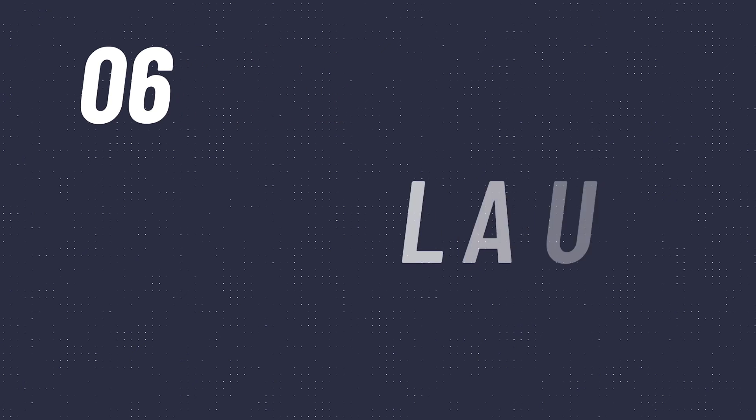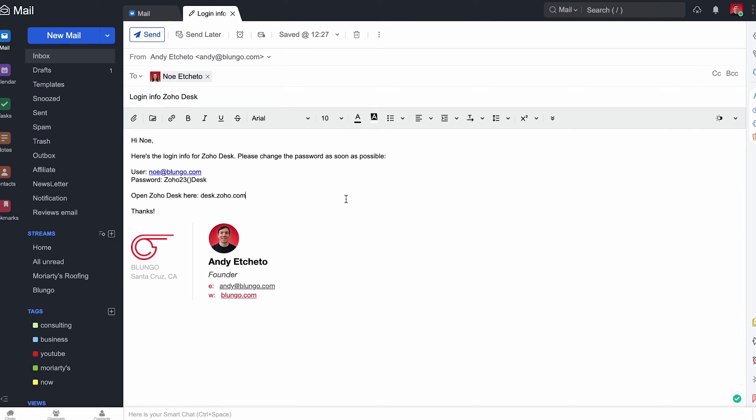Once the data is in the system, you're ready to launch the app. Normally, you should set up a meeting with all the users and explain why the company is implementing a new app and how it will improve things for the user. Make sure to do a complete overview and answer any questions they might have. Hopefully they already watched the video tutorials, so they will have good questions for you. Right after the meeting, the users should get the login info so they can sign into the new app and start using it. There will be a lot more questions in the first week, so it would be great if the users who helped you test the app also help you answer questions.